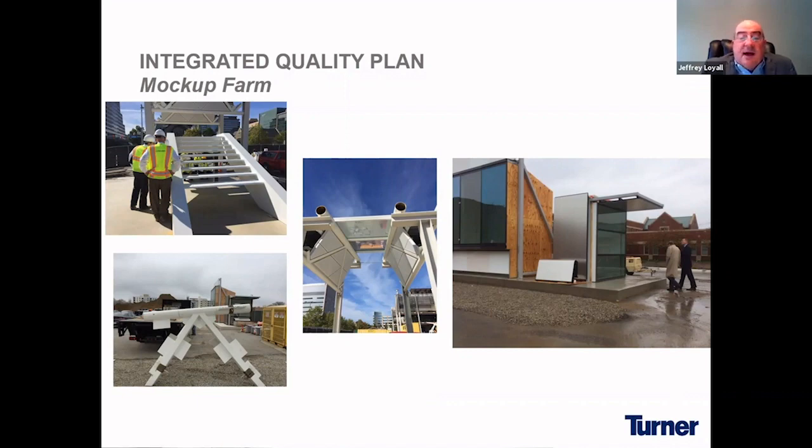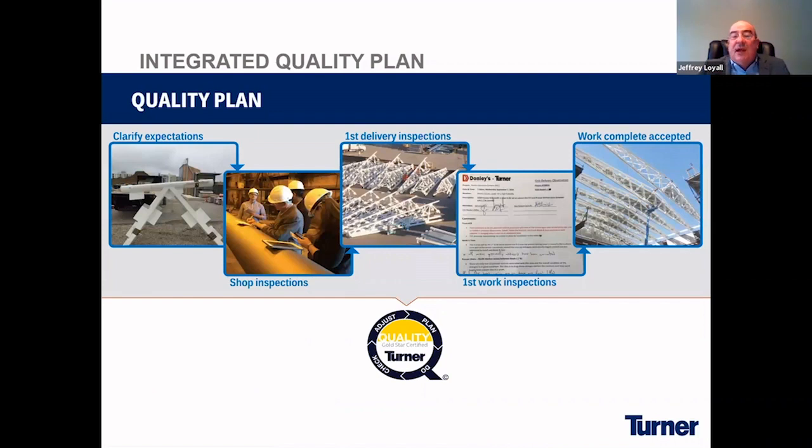And so if at any time, anywhere, any of those trusses came to the site and someone had an issue with one of the welds, they were to go back to this collage of welds, see what the agreed upon feature was, and that would be your compare to. And one of the beauties is every piece of truss that went up onto the structure, not one was ever rejected. So it was a success. On the next slide, Russ is going to walk you through that quality program that we utilize for all the definable features.